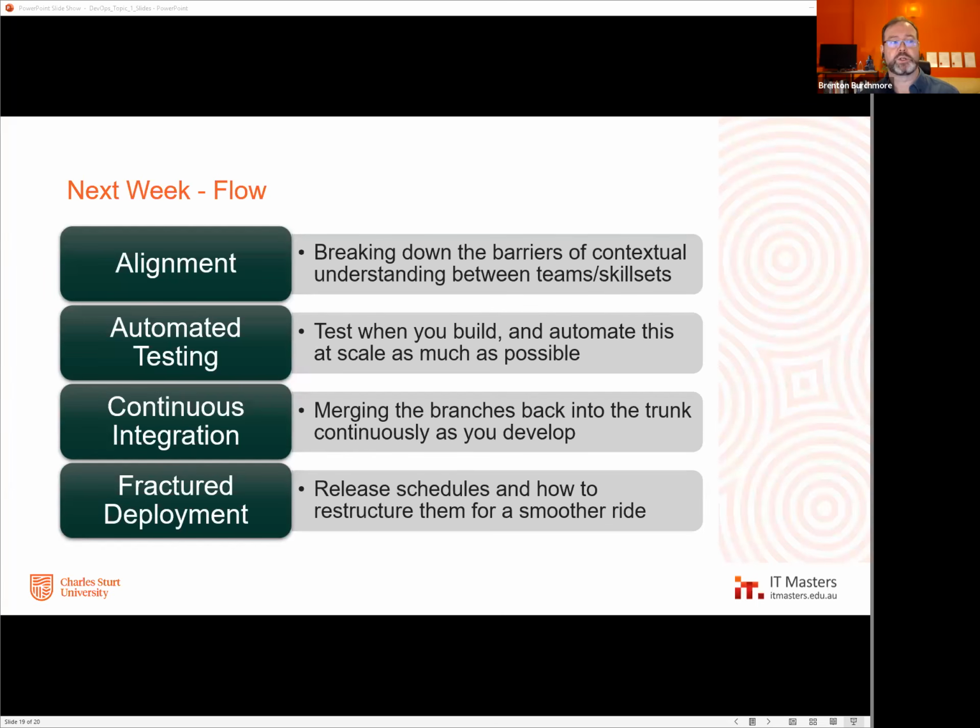And Waterfall's approach is, well, we figure it all out in advance. We figure out every possibility. We get every expert in, we estimate, we painstakingly work through everything, and then we build in contingencies. We lock things in so they don't get messed about with, because that'll cause us problems. But we build mechanisms in that allow us an authorized, regulated change control that very tightly controls how we evolve things. And that's our way of protecting ourselves from making a mistake, because we're extremely thorough and we're extremely careful.